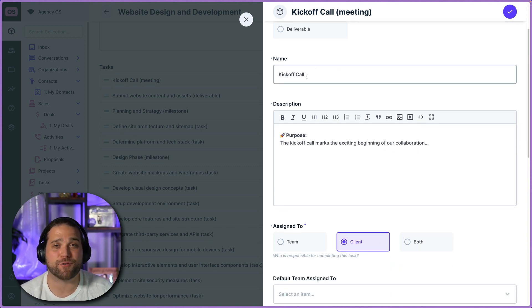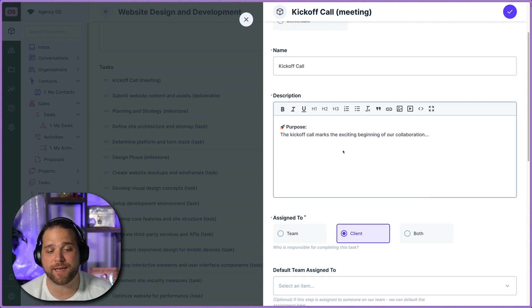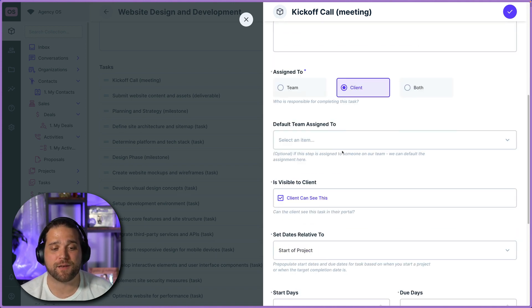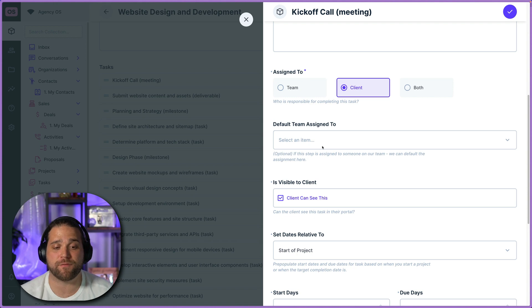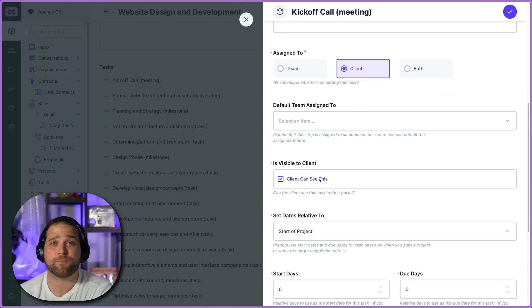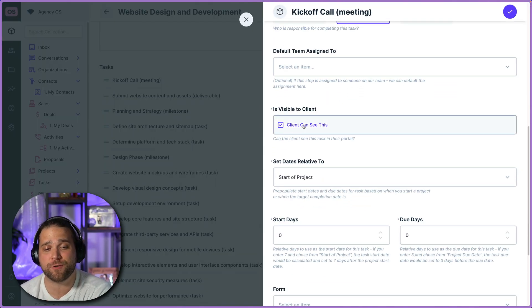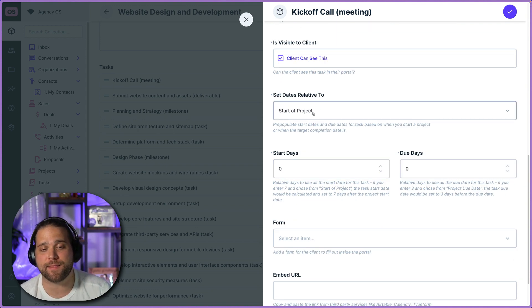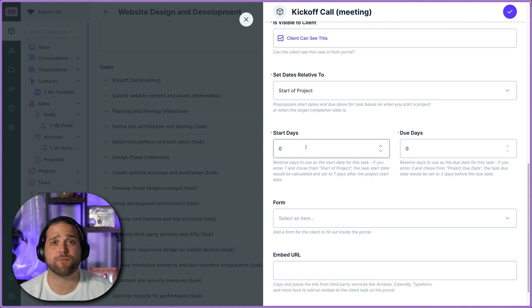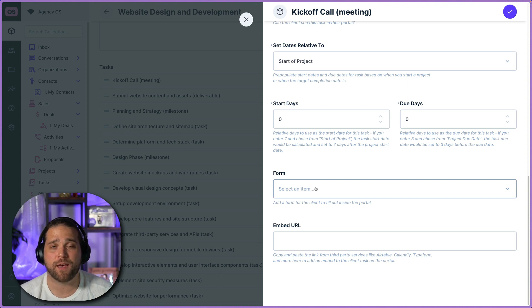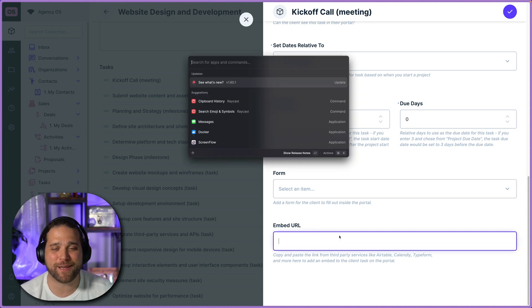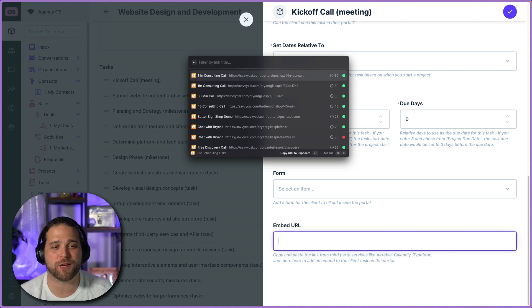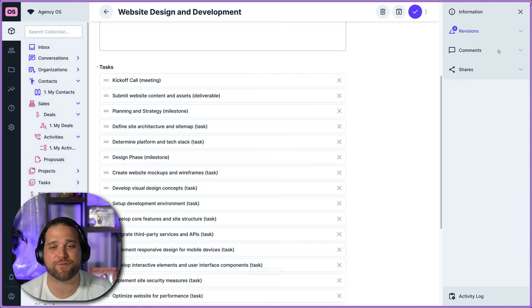You can make this visible to the client. You can even set dates relevant to the start of the project or when the project is due to start and end this specific task. So you can really systemize each one of your projects and hopefully gain more efficiency than creating this project plan one off every single time.